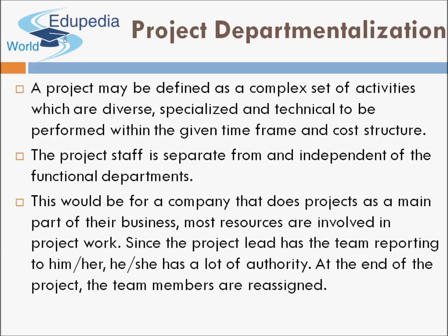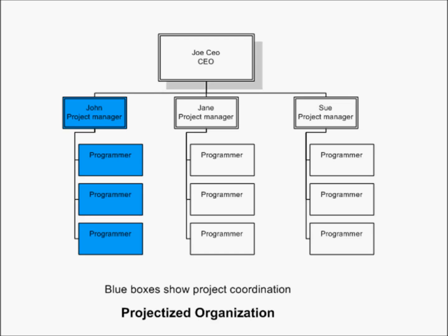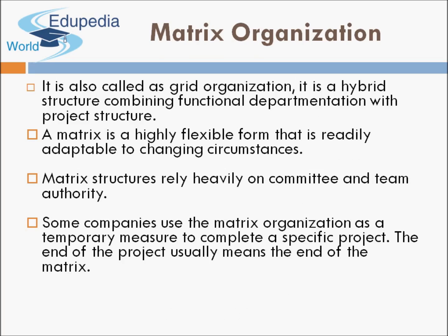When people are dealing with these projects, they are only dealing with the projects and not reporting to their respective functional departments. This structure is for a company that does projects as the main part of its business. Most resources are involved in project work. The project lead has the team reporting to him or her and holds a lot of authority. At the end of the project, team members are reassigned. In the diagram, different project managers each have people working under them.